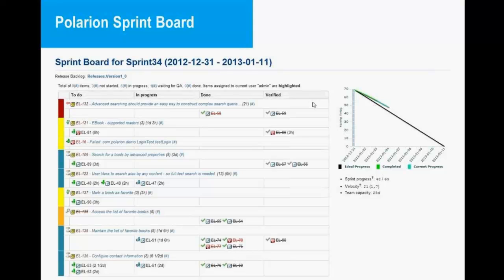But sometimes during software development, there might be, of course, some new defects which will be added at the bottom of this user story, so they will start in to do. So sometimes you might have a successful sprint. Sometimes there might be still some open work which needs to be done in the next steps, but that will be added then to the next sprint.